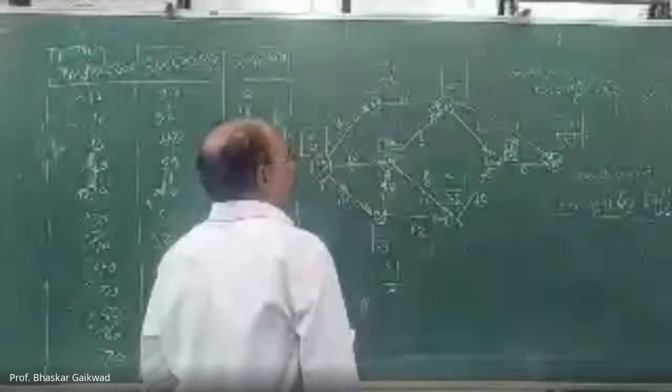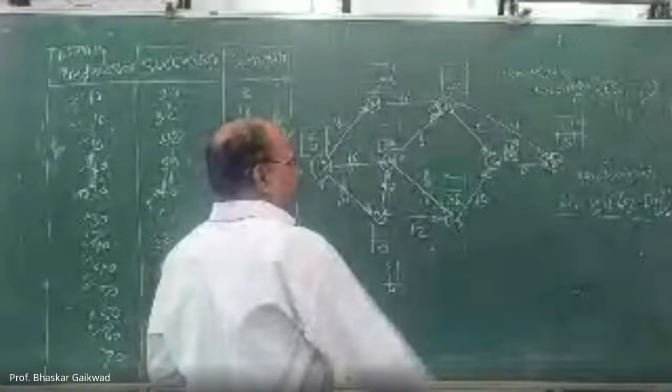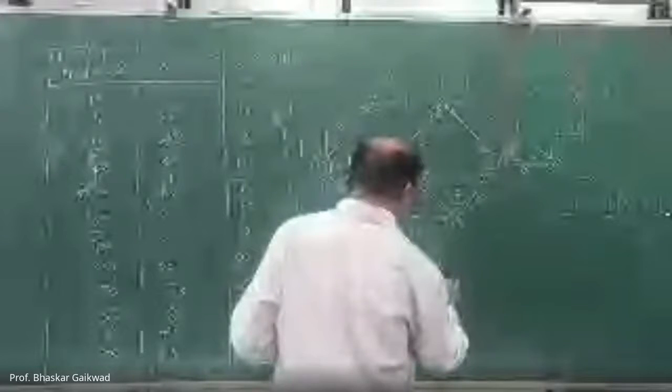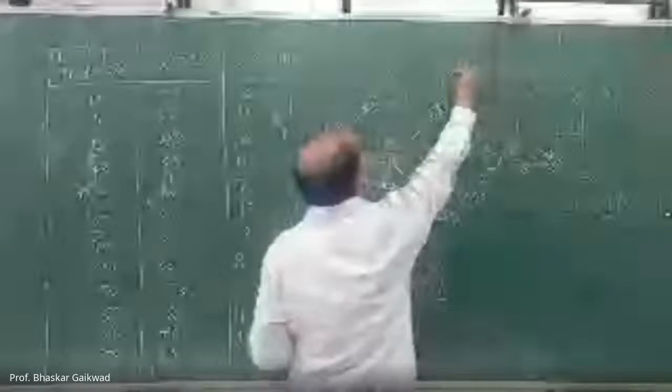Then here again one more activity is there. So 43 and 6. Which is the minimum that you have? The two activities are there here. 51 minus 7 is 40 here, 43 minus 6 is 37. Which is the minimum, either 40 or 37? 37. So here you can write 37.